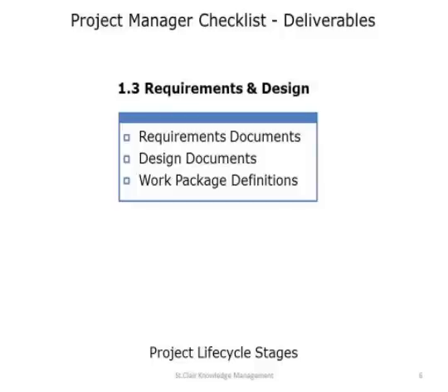The final step within the requirements and design process is the work package definitions. Now, what that really is, is just a chunking up, or the breaking up, of work. So in your requirements, you're saying this is what I want. In the design, you're saying this is how we're going to accomplish it. And then in the work package definitions, we're breaking up the work into manageable pieces that can be given to individuals, or to consultants, contractors, or other groups to do the work.